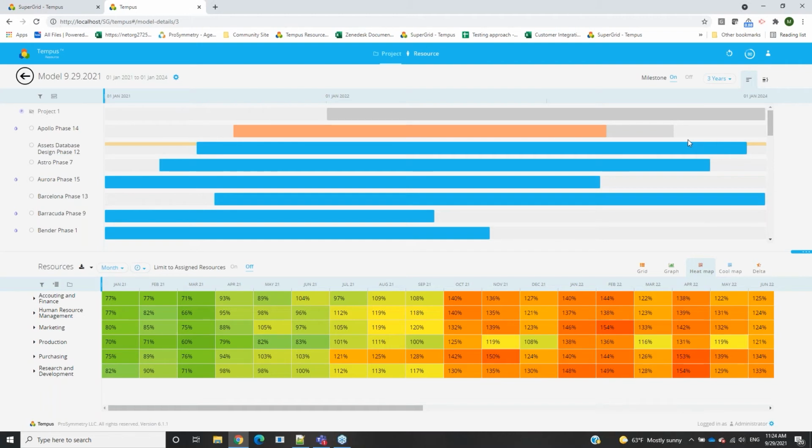When you do make those changes, you see that the bars display this orange, just to let you know that a change to the start, or the duration, of the project has been made, and you can quickly identify that that has happened. Very important, especially if your project doesn't have as much time as you initially thought. Maybe you need to reprioritize and it needs to be done quicker, or maybe you're losing resources and the duration is going to increase because you just don't have as much FTE to work on the project. So a couple of scenarios there to work through.